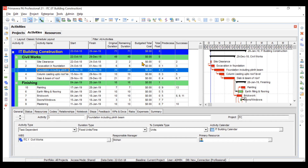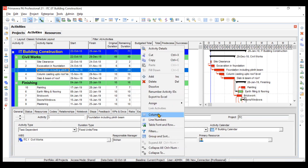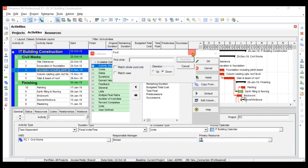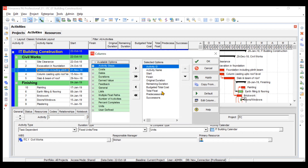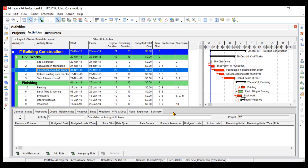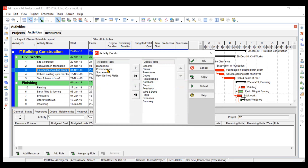Suppose you are adding one mason and he is working for three days — based on his charges per hour, the total cost will change. To add this column, go to columns and find the 'budgeted total cost' option and slide that column into the selected options. In the activities tab, you also need to add your resources column, which you can do using the customized activity details.